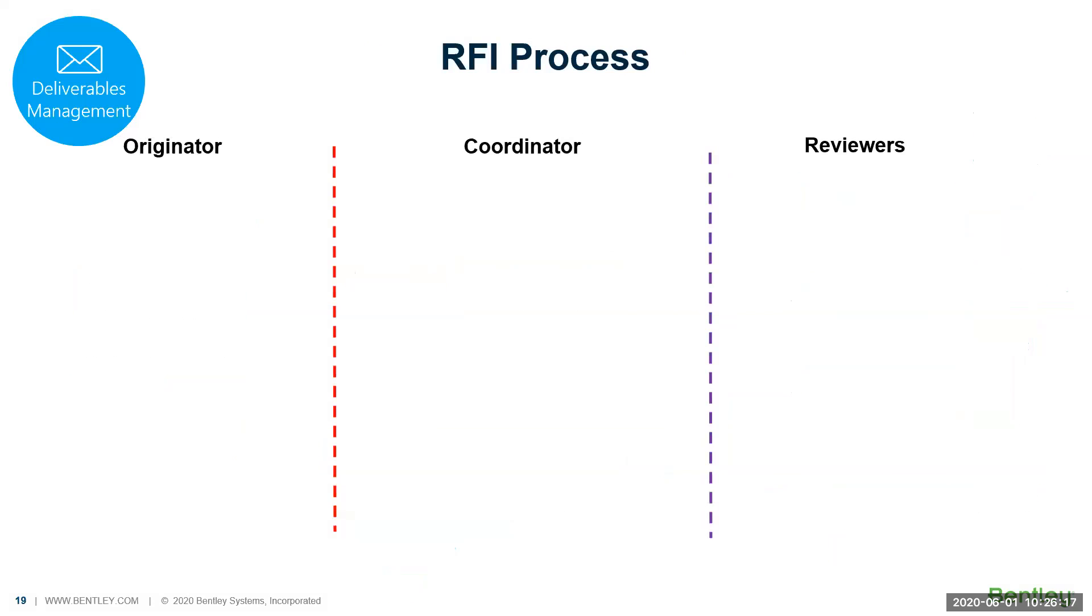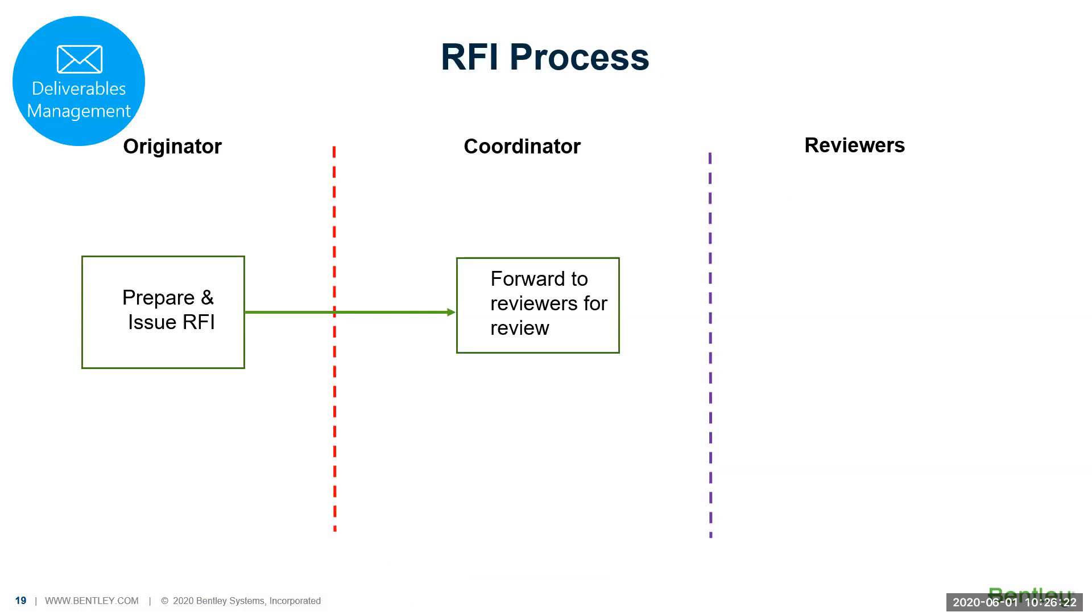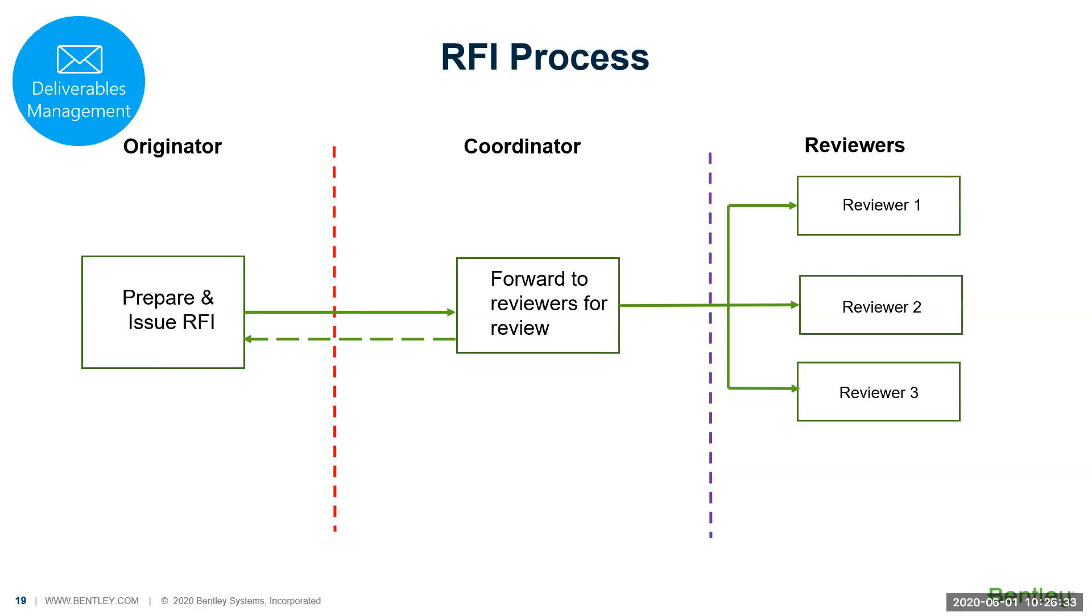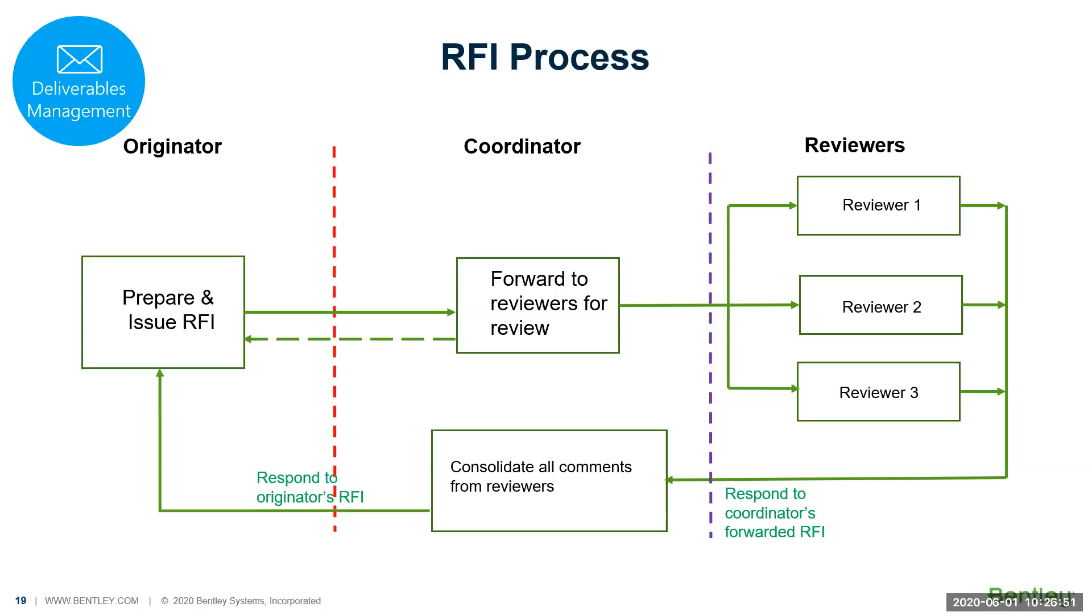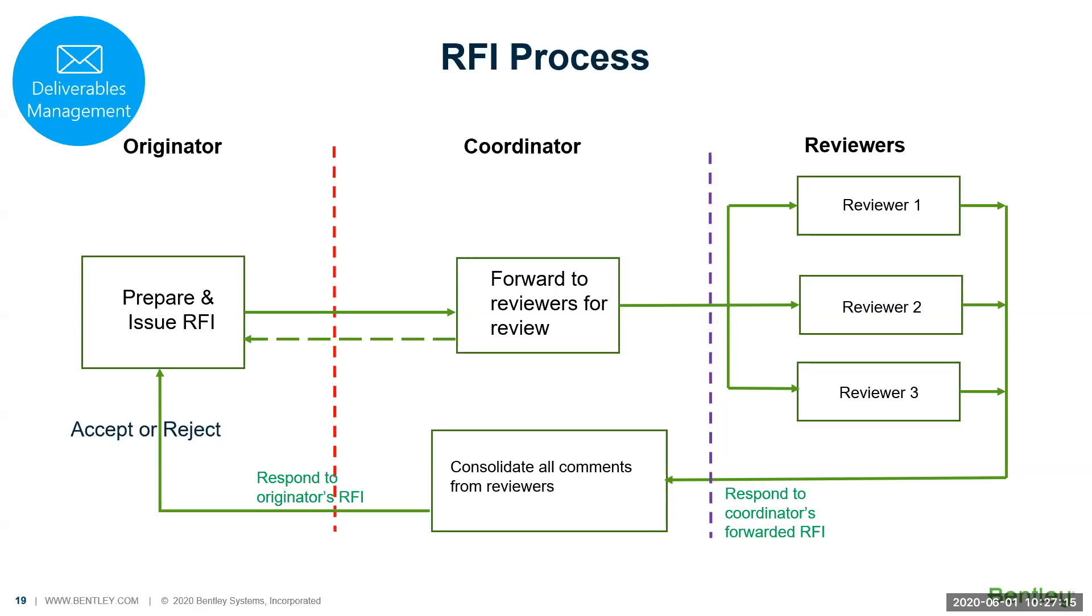Same for the RFI process. The originator, the sender, can prepare the RFI, issue to the coordinator, and respond back to the sender. Or if they think they need some more additional reviewers, they can forward this RFI to many parties. Each of them can give a comment and respond back to the coordinator. The coordinator can just click summarize. It will summarize all the comments together or remove one or two comments from the consolidated comments and then respond back to the sender. The sender can either accept or reject. If accepted, the RFI will be closed. If rejected, the RFI will go into the second cycle until all the RFI questions have been closed up. Then you will close and accept the RFI. The first cycle, second cycle, and third cycle—all this RFI-related comments are all linked together.